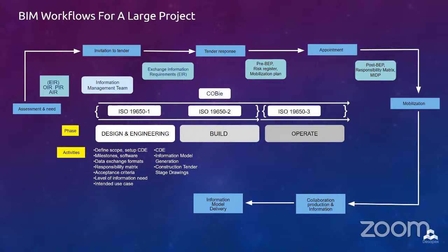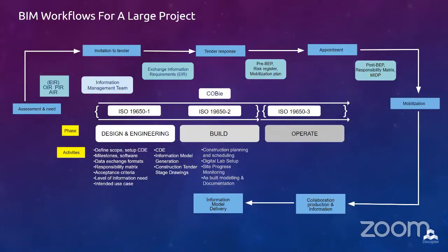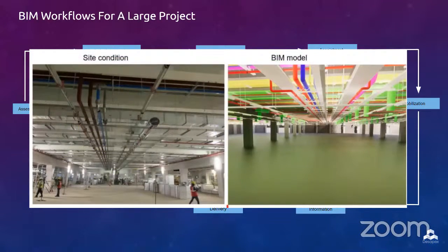To monitor or check the construction site progress, the owners can make use of laser scanning technology to scan the building according to a routine schedule and compare it with the building's 4D and 5D simulation plans to see if the building's expected schedule is being met. Not only schedule, this also helps in documenting stage-wise milestones of the building and preparing the progress reports for the building owners and senior management personnel or any other relevant stakeholders who cannot attend the regular site meetings, especially during this pandemic. They can make use of the accurate and the detailed building scan data.